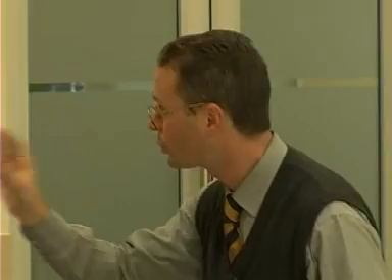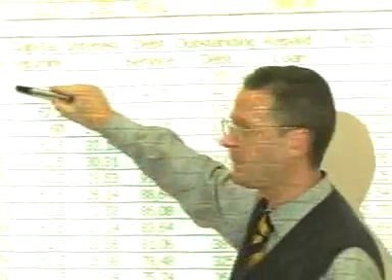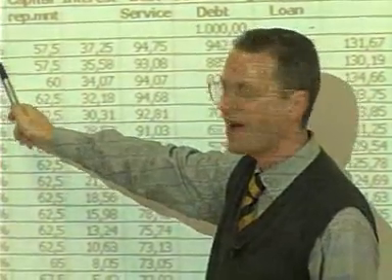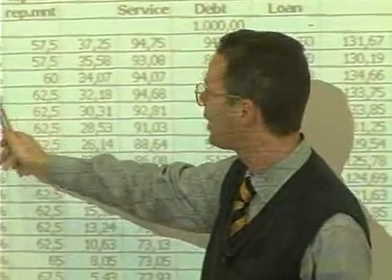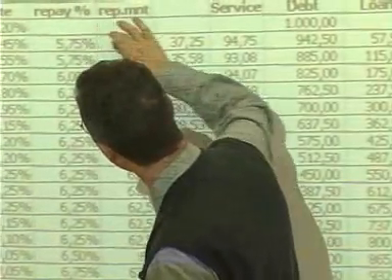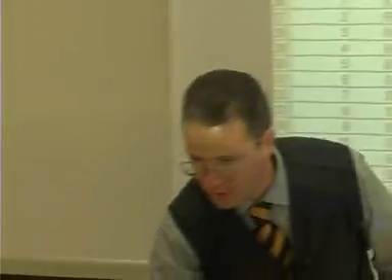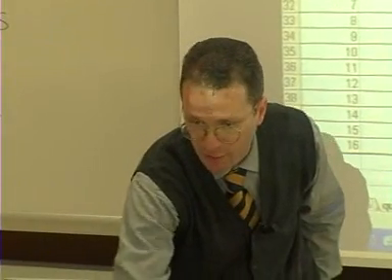So when a project performs in this way, one possible solution could be to reduce the capital repayment of the first 2 years, moving from, let's say, 6.25, 6.25 and 6.25 to this alternative solution. I reduce the first year by 50 basis points, 5.75, 5.75 and 6%. And I move what I used in these 3 years on the final years of repayment. Look, in this case, what, for example, the arranger of this loan has done.